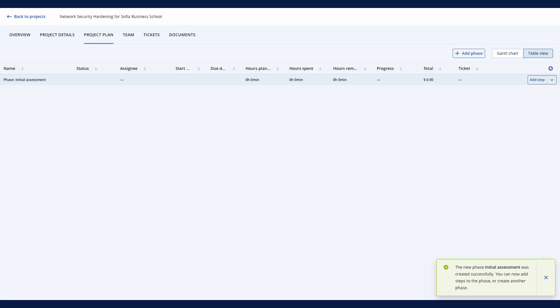A single phase can include multiple project steps and may optionally end with a milestone step for billing purposes. A project phase may contain multiple steps, each representing an individual task.